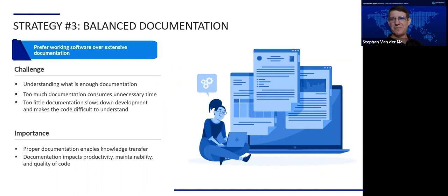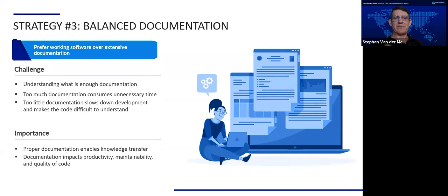Let's go to the third strategy: documentation. This may seem boring — nobody wants to do it. However, Agile says we prefer working software over extensive documentation, but note: it is over extensive documentation, not above all documentation. There is a place for documentation, but it needs to be done in a balanced way — just enough. Too much and you consume unnecessary time; too little and it takes too much time for a new person to learn the code, or even for the same person returning to the project later.